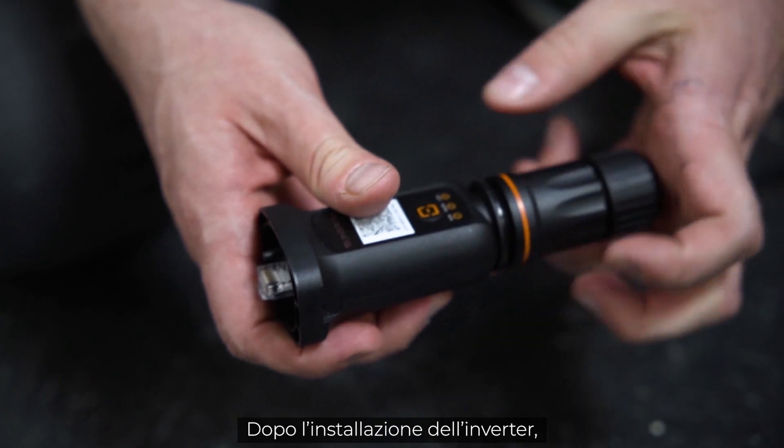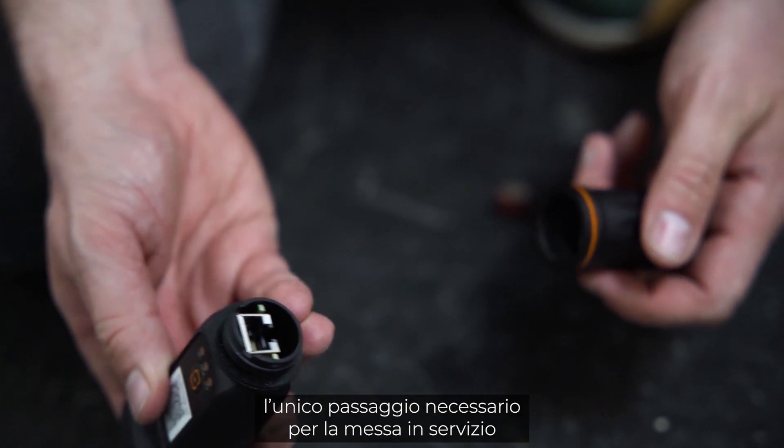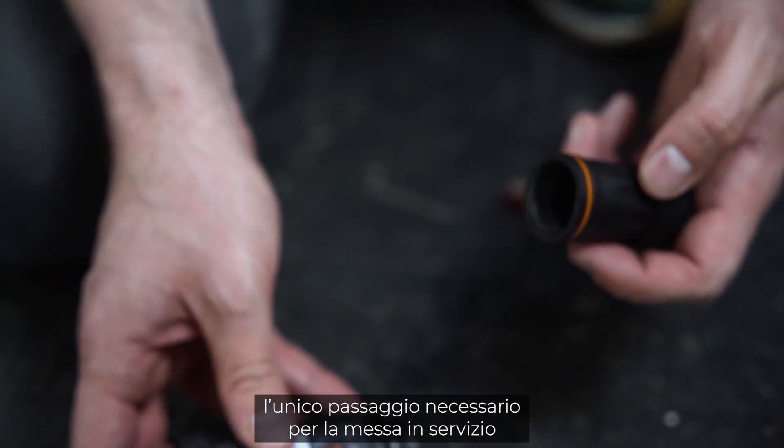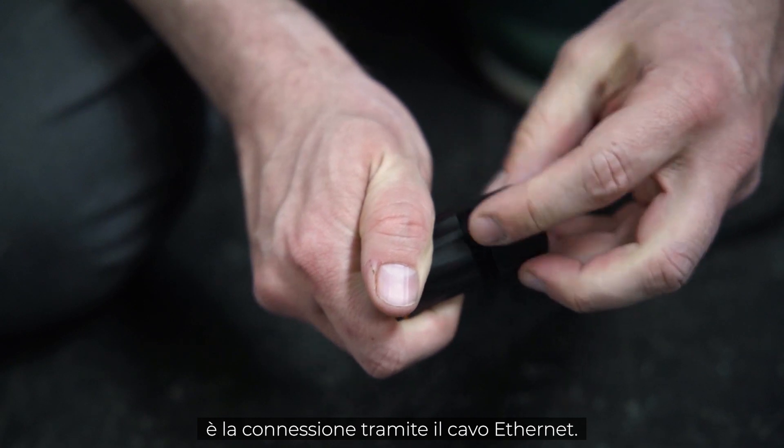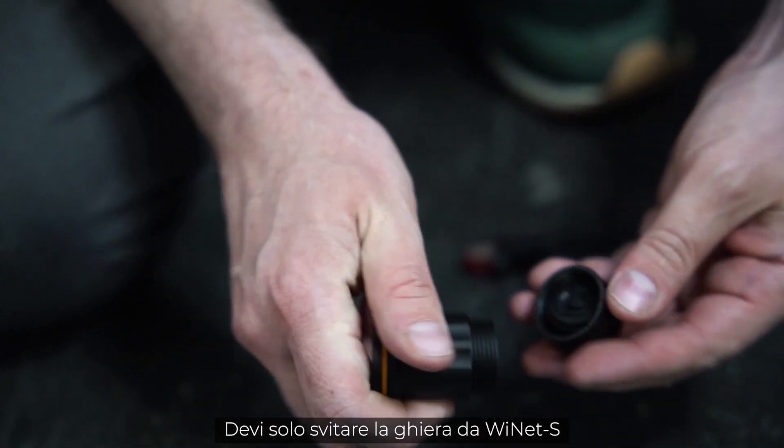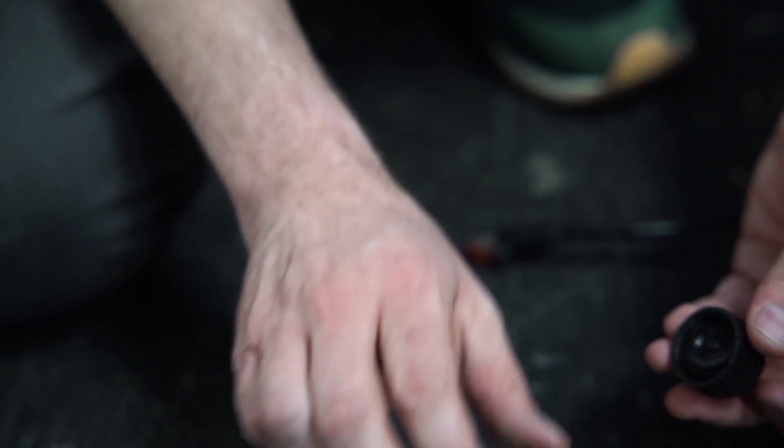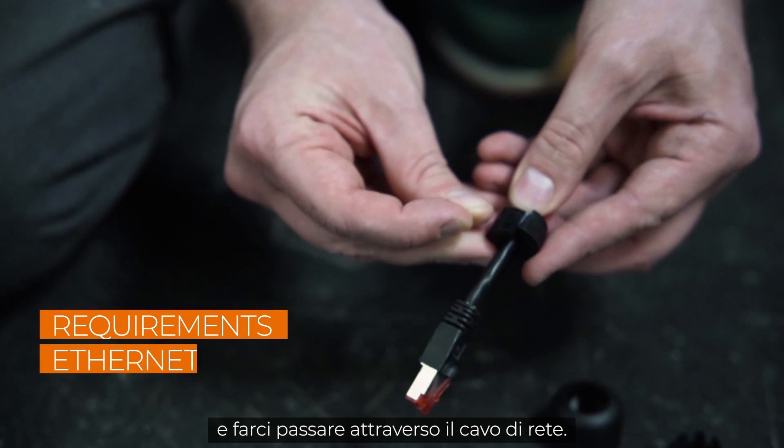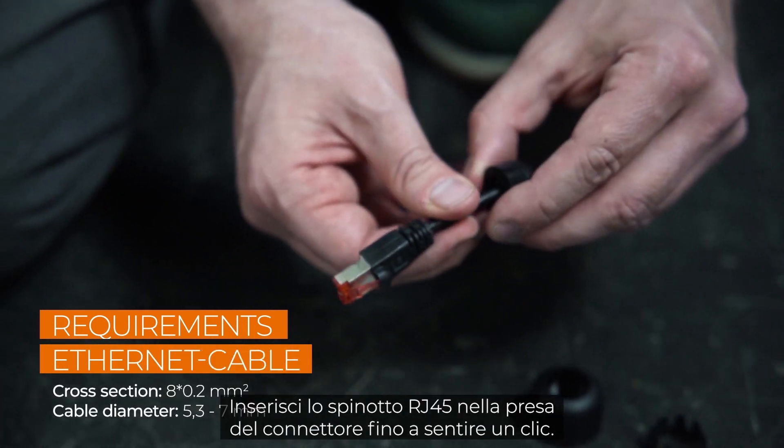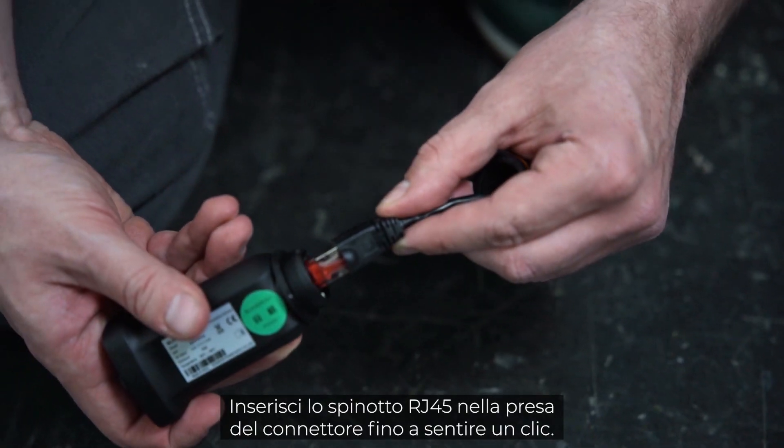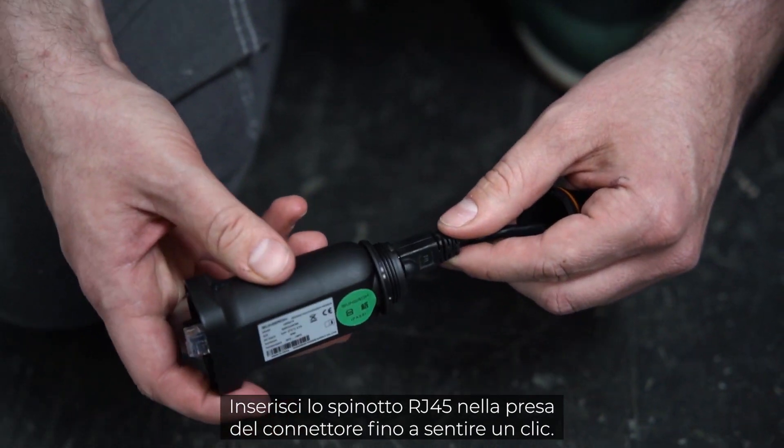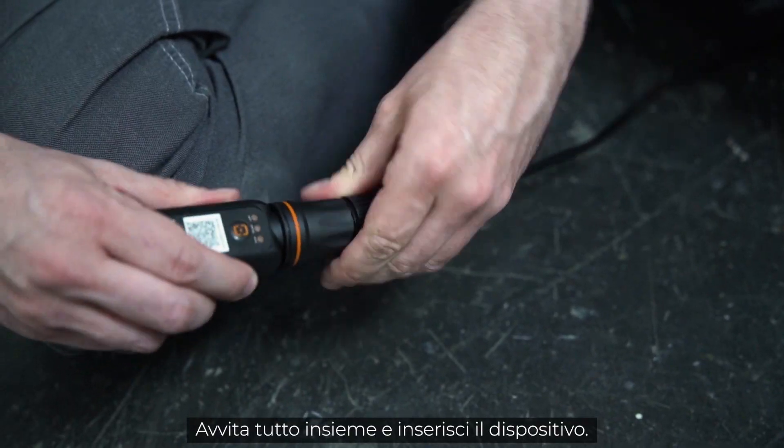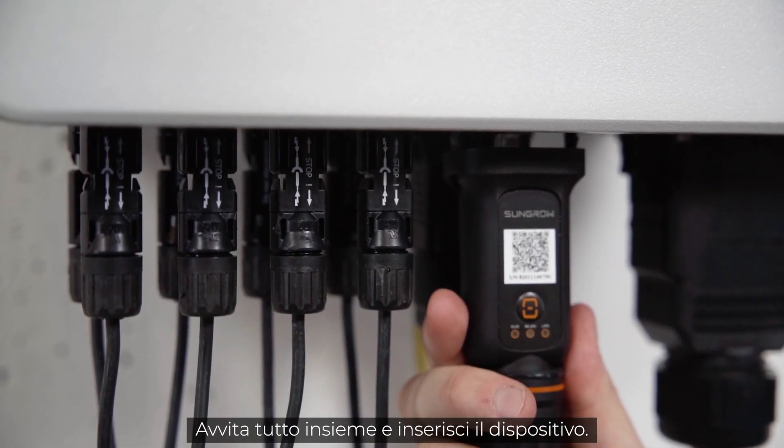After the installation of the inverter, the only required step for commissioning is the connection via Ethernet cable. Simply unscrew the swivel nut from the Ynet S and thread the network cable through it. Insert the RJ45 plug into the plug connector until you hear a click. Screw everything together and plug the device in.